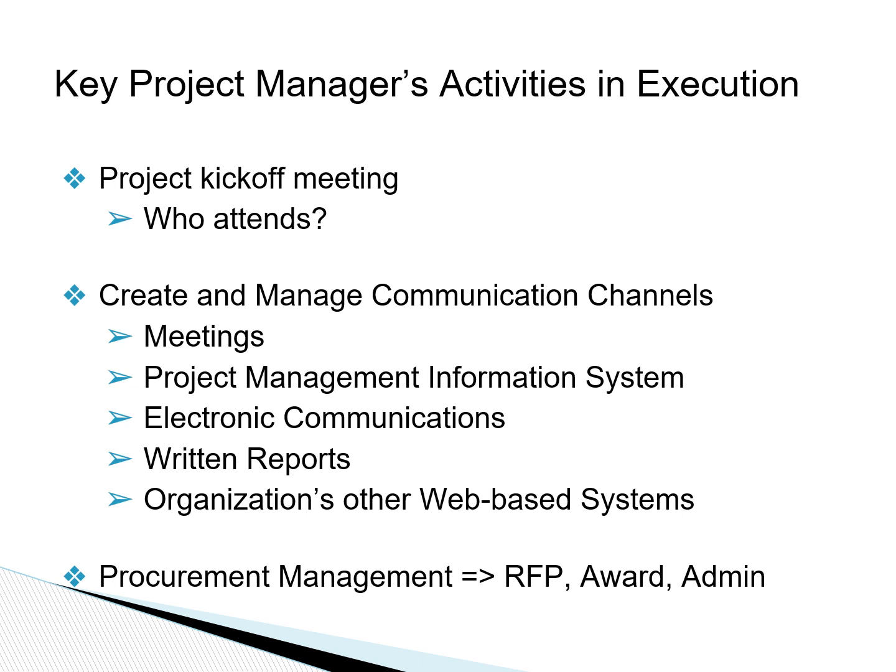These are some of the key activities that the project manager leads during execution. The project kickoff meeting is extremely important to get the project started in the right direction. For an effective kickoff meeting, it is necessary to have the project executive sponsor present in the meeting to directly communicate the importance of the project to all project participants.